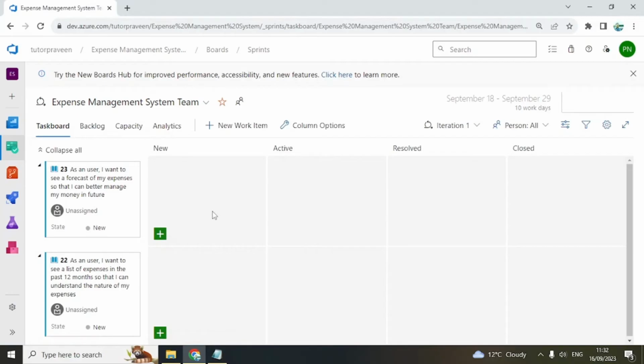So you have the stories. Now it is the start of a new sprint. You are completely starting a project, so you don't know the velocity of the team. Velocity is calculated based on how much a team is delivering in a sprint. Let's say in your team you have 2 developers and 1 tester, so 3 people. Those 3 people may deliver a certain amount of work in a sprint. In the second sprint they will again deliver a certain amount of work, and in the third sprint again. This certain amount could be a number of hours.